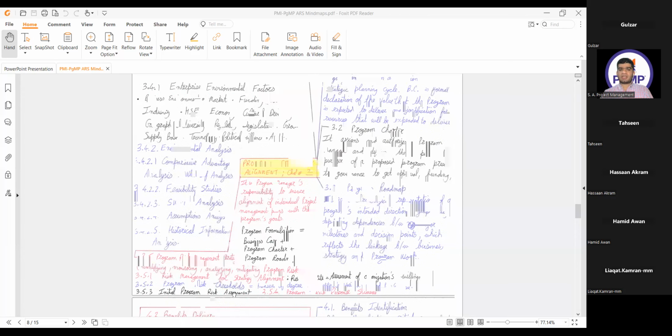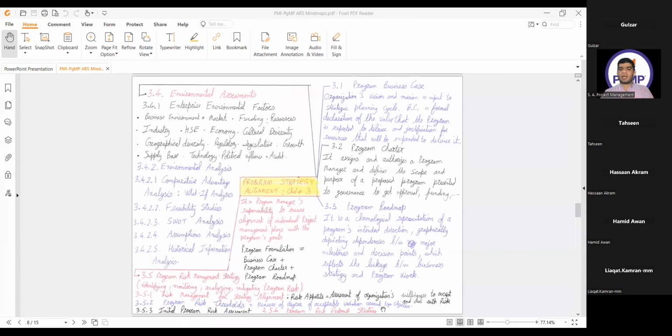Risk threshold is actually a measure of limits, lower limit or upper limit, a measure of the degree of acceptable variation around the program objectives. If it crosses the bottom level, it means the item will go in the risk register, we have to consider it. And if it crosses our upper limit, it means we have to escalate it.